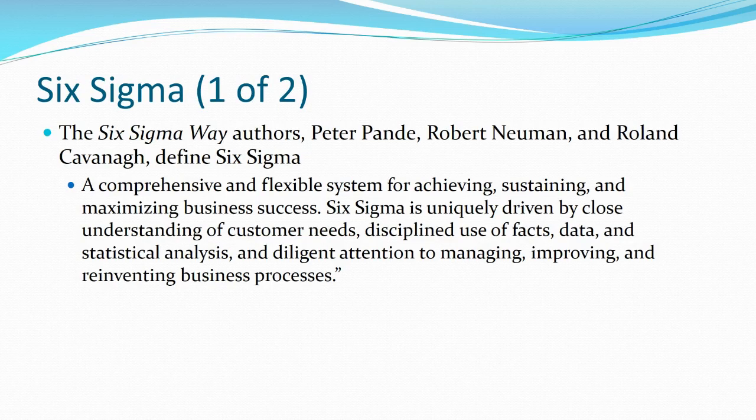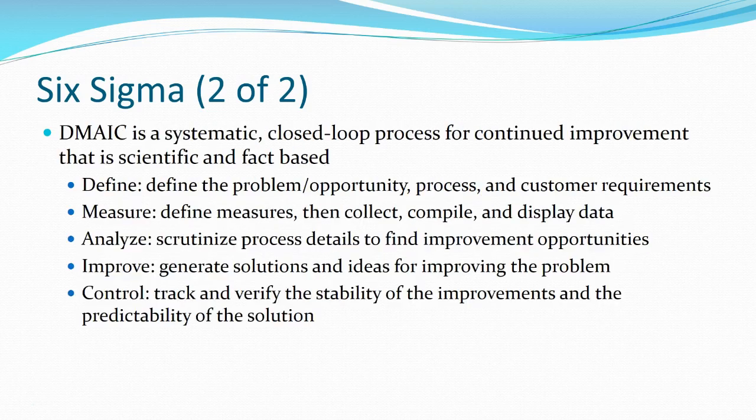Six Sigma is a very popular business-centric method of ensuring quality, measured by a belt system — someone more versed in quality could be a green belt or a red belt. It's a way to align strategic processes with quality. As part of Six Sigma, we have the acronym DMAIC: Define the problem, Measure what it is you're measuring, Analyze where problems might lie and where defects may come from, Improve the process or product, and Control — on a regular basis, reassess.